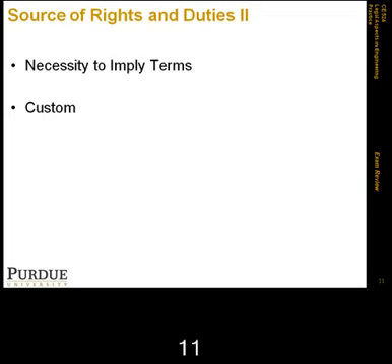So contracts, both implied or express, either imply or express that the contractor will comply with building laws and land use controls, and when the design and construction process are separated, the design is usually the owner's responsibility. However, the contractor should not ignore the law and should direct the attention of the design professional to any violation of code or building laws.